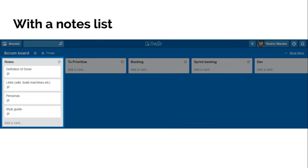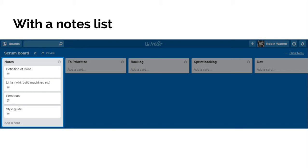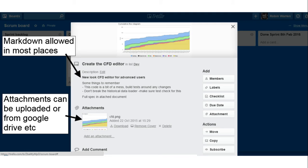And finally, over on the left, what you'll see a lot of people doing is adding a notes list, which just lets you put your definition of done, decisions from recent retrospectives, links to style guides, build machines, wikis, things like that. It's nice because it's always there and immediately accessible for everyone who's working in the board and can serve as a useful reminder, especially with decisions from retrospectives.